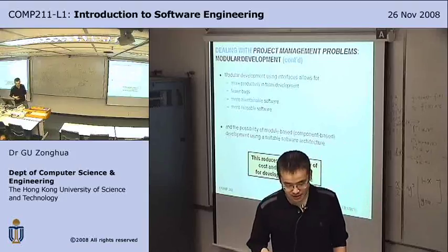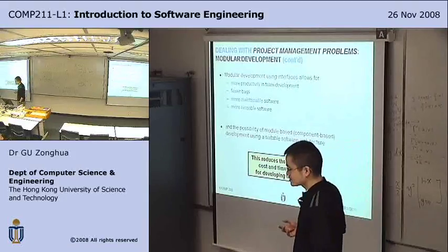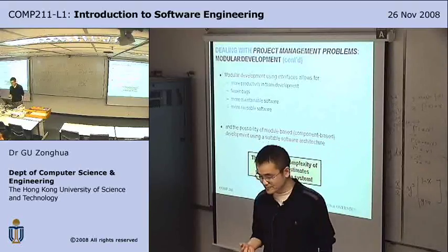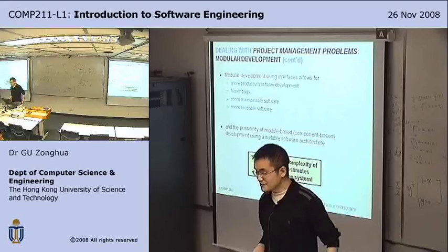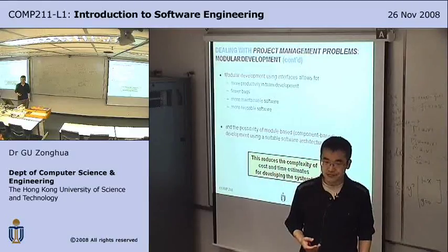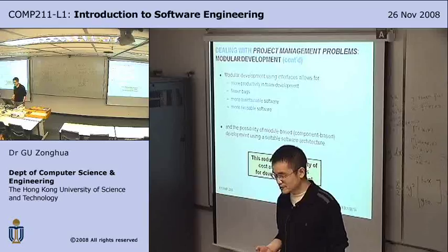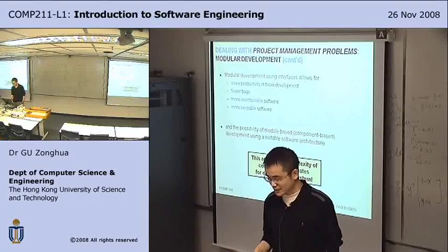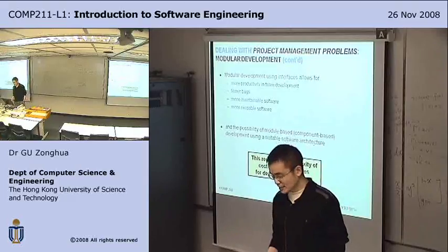We discussed project management: estimating a project cost in terms of human, monetary and time is very difficult. So it's always easier to do the estimation for a small piece than for a large piece. Therefore, modular development helps you to estimate the cost for each module and then sum up the costs and time